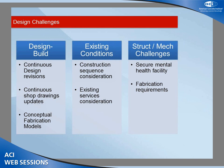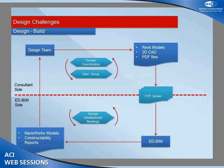Some challenges with a design-build project: the design is constantly evolving and we're making sure that as the design emerges it stays on target. The same applies with shop drawings — in design-build we're sometimes designing and building the next day, so we have a very short window to make sure things are going to work before they hit the job site. Another challenge was that we were tying into an existing building with lots of existing services to avoid or tie into. And structurally and mechanically there were challenges ensuring the whole facility was secure — for example, instead of a typical access panel, you might have a very secure access panel that requires more coordination.